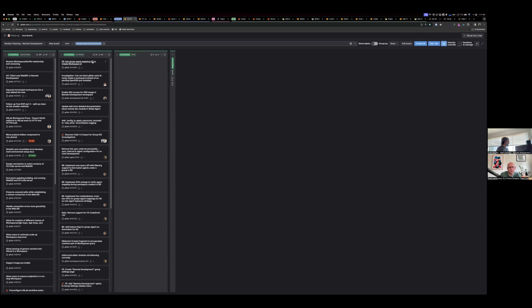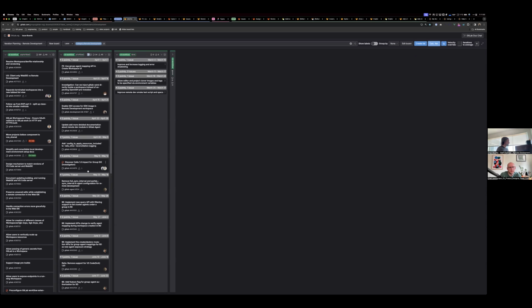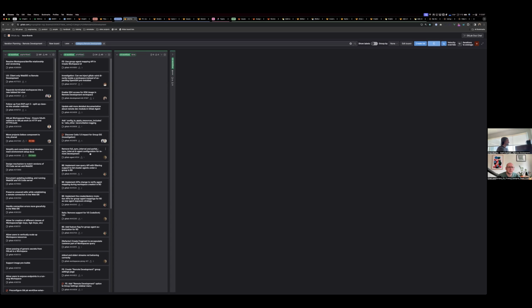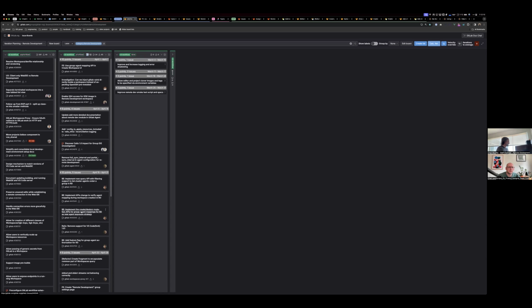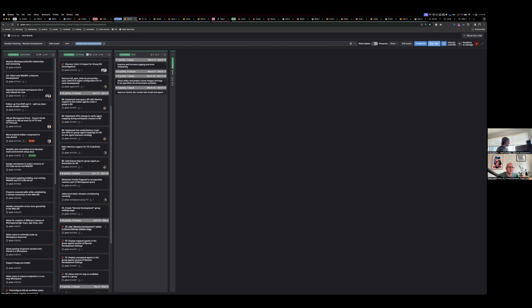If the developers are just looking at what is a priority, a lot of times they will do this. But during our high-level planning and iteration planning meeting, especially where we want to see when we expect to deliver something, a customer or stakeholder asks when you expect to deliver something. Like I said, our velocity is like 2 now because of Summit, and we didn't do a lot last week, but say our velocity was like 10, something more normal, or 5 or 8, then it lets us predict it. So yes, whenever we want to see what our iterations are calculated, we use this mode.